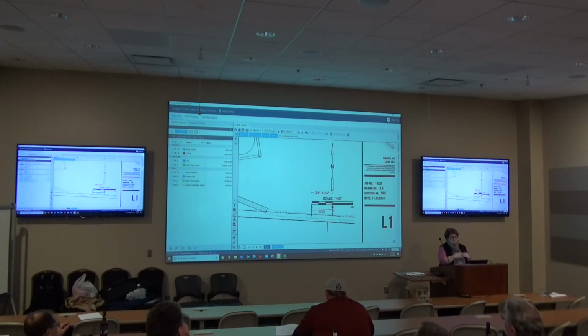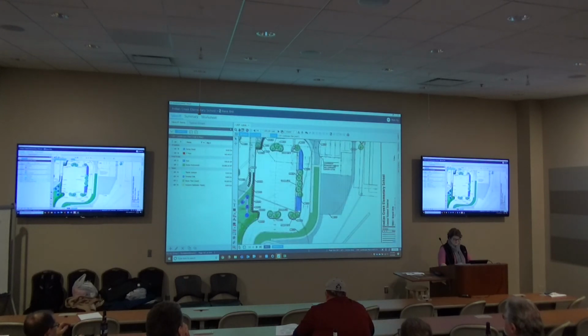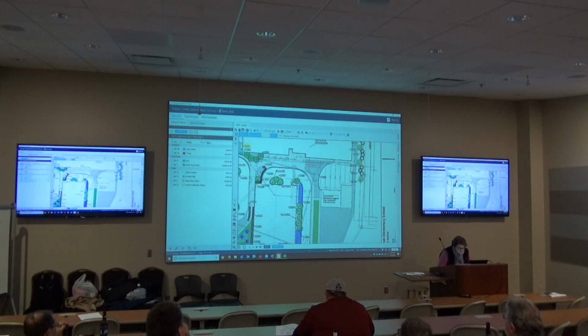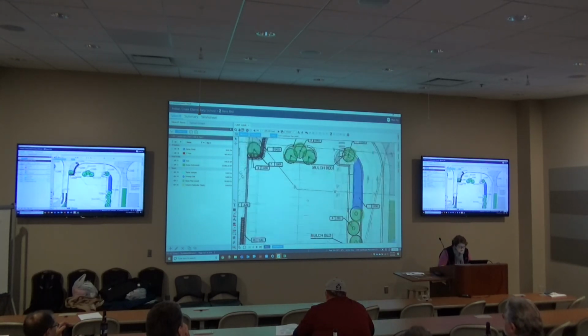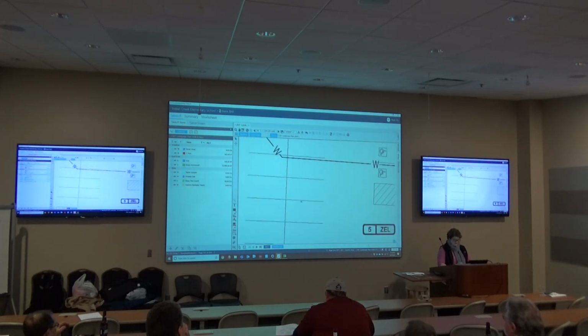It does, but at my company, I do not permit my employees or myself to check a scale off a graphic scale, because that's not a tree, and it's not a pipe, and it's nothing that's going to show up and get built. So can you do the same thing you just did on the plan someplace with a known dimension? Let's see if there is one here. Parking spots. Yeah, our fallback is always a 9-foot parking spot.